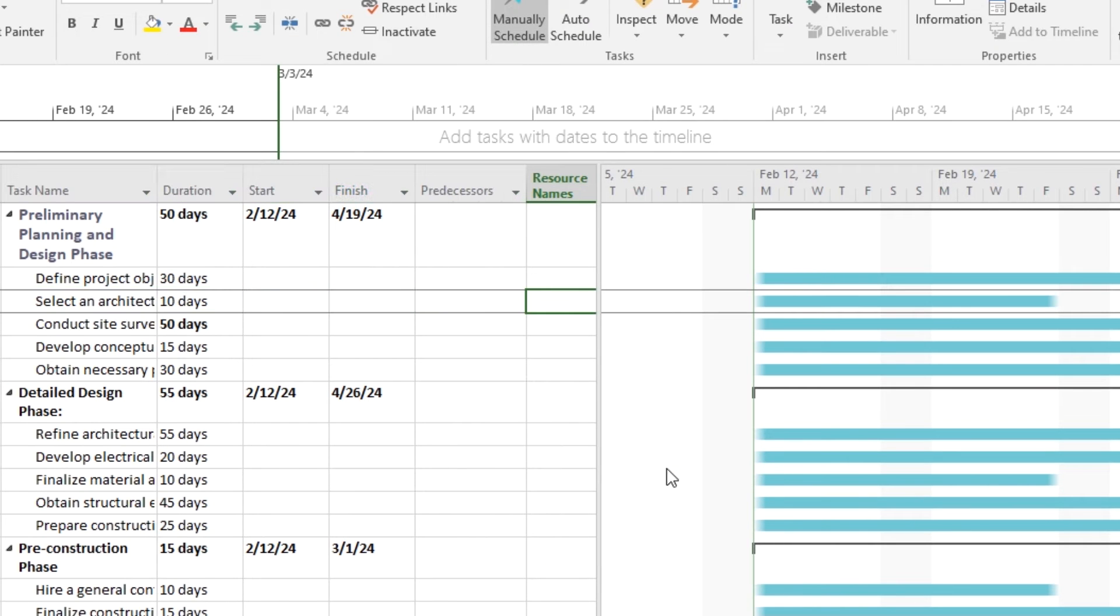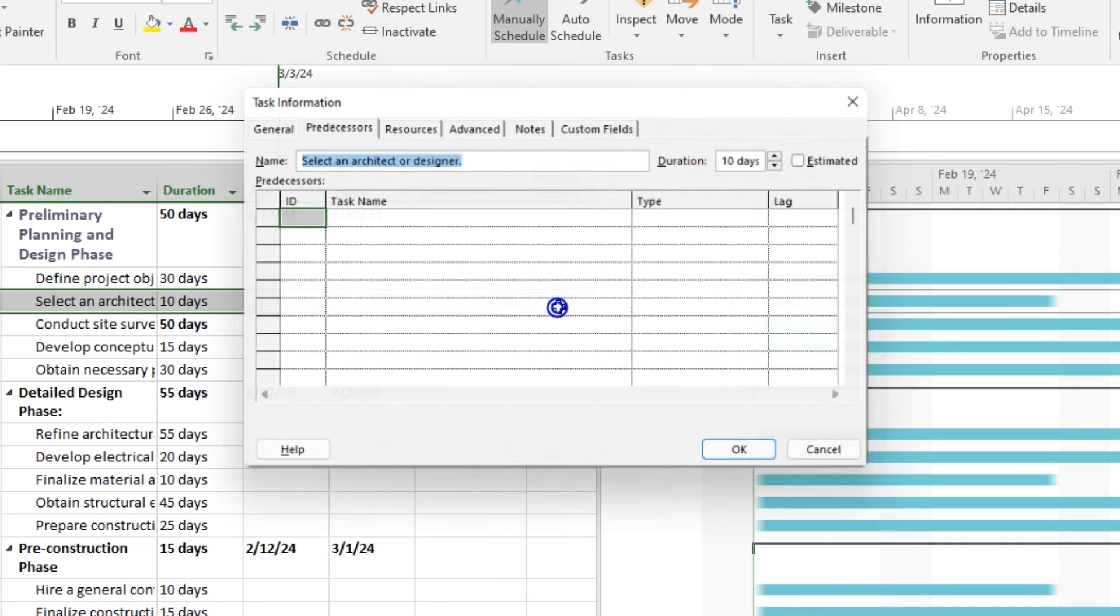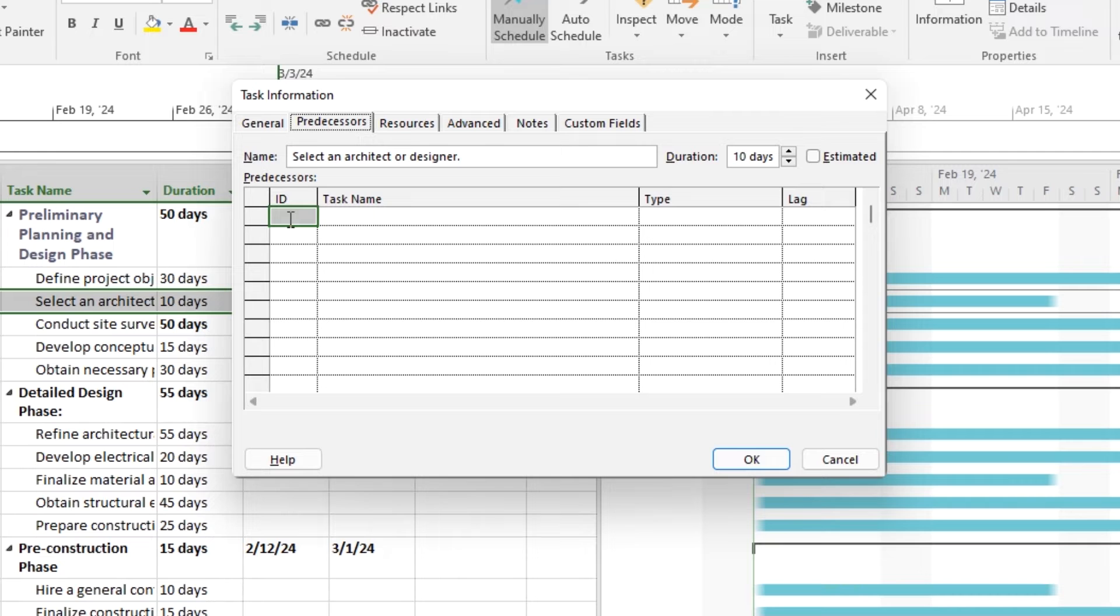In Microsoft Project, you can link multiple as well as individual tasks. After selecting the task, go to the Task tab on the ribbon. Look for the link tasks button in the schedule group on the ribbon. Click on it. A task dependency dialog box will appear.